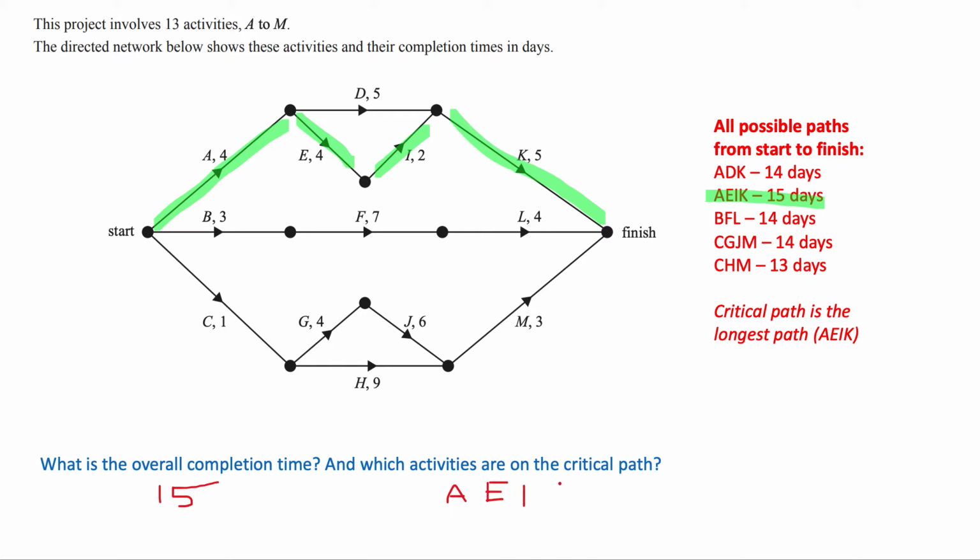All right. Again, you'll do much better handwriting than me when you do your SAC, but that gives you a sense of how to work out the critical path or the overall completion time. And you can see there's different answers to those questions, but they both rely on finding out the same information. Another way that question could have been worded is, which activities cannot be delayed without delaying the overall project. That would be another way of telling you the critical path. So there's a few ways that these questions can be asked, but the more you practice them, the more you'll pick up on the tricks.